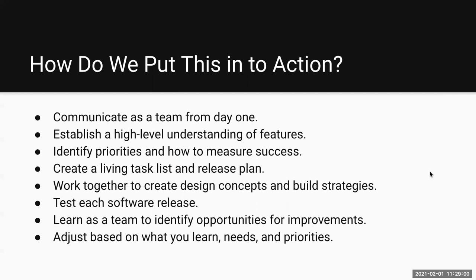Make sure that you understand from a high level what the features even are. What are you building? Not how. Don't worry about the how. Think about what. What is the outcome that we're seeking? We'll work backwards from there. And then try to prioritize those things. So that way you're building the most important piece first and then moving sequentially. That allows us to pull out pieces and add pieces as necessary within that plan without a lot of waste.